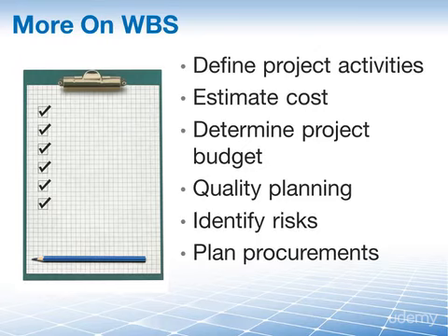And because the WBS is such an important part of the scope baseline with all these things resulting from it, many companies have WBS templates that you can use. Usually your PMO will provide that. If you don't have a PMO, you can also use the WBS from a past project as a template, as long, of course, as this past project is similar to the one that you're executing right now.